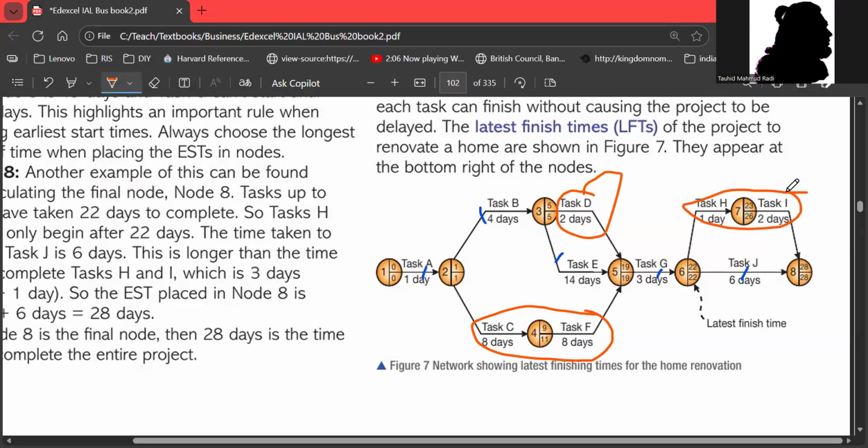These activities have time to waste because they are not in the critical path. The places where there is no scope of wasting time, that's the critical path. Those activities that have time to waste have free float, and if you add all this free float, you'll get the total float.